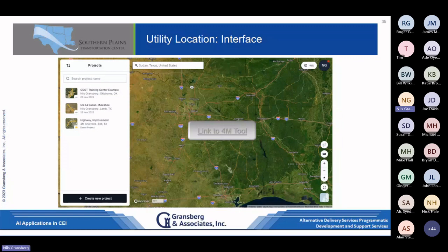So these are the kind of tools that are out there. The application for this is especially up front. You're looking at doing right-of-way acquisition. You're looking at doing utility relocation. I need to know what's out there, and if they've mapped the area, it'll pull up a list. Hey, here's all the utilities we think are here, here's who they are, here's their contact information, right? That gives me a hit list. And if I've got a hit list, I can then start the process, right? Hey, I think this is here. What do you think, right?